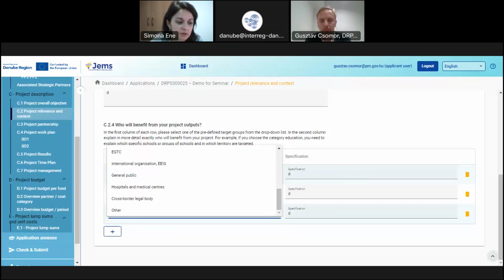It is the responsibility of the lead partner and the partners to use it and decide if they are financially strong enough to participate in the project and support the pre-financing, because, as you well know, we are not giving any pre-financing. The program is based on the principle of reimbursement, even though some countries can provide an advance from the national co-financing, but this has to be checked with the national contact points.